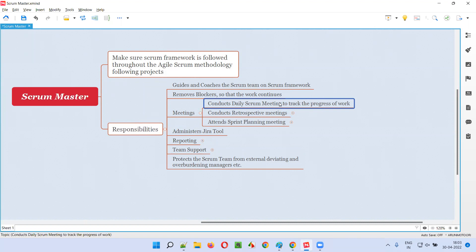In the daily Scrum meeting, the Scrum Master will check with each and every Scrum team member to see where they are standing — what work they have completed, what work they are currently doing, what work they plan to do tomorrow, and whether there are any blockers while they are working.